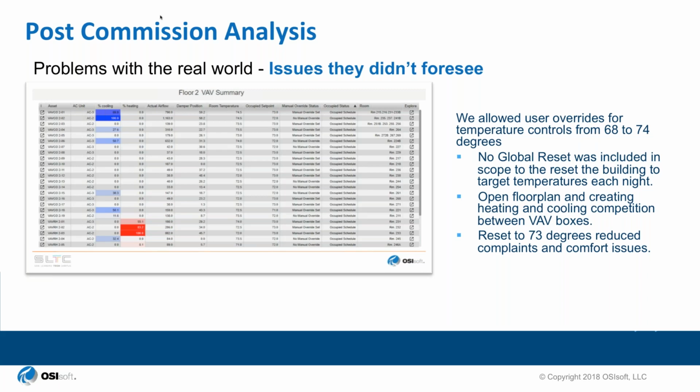So do they cut corners in the process? Absolutely. Is the design spec that a commissioning agent is going to do later spot on? No, it's missing a lot of things. So they expect that there's just going to be this cleanup process. It's a naturally occurring thing. Just recognize we're not delivering everything you need, just what you asked for.